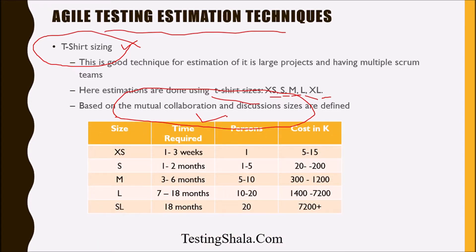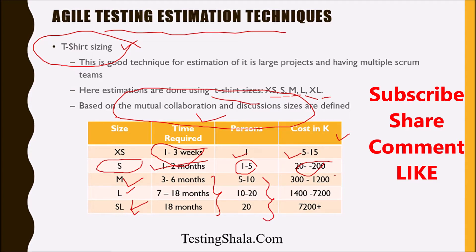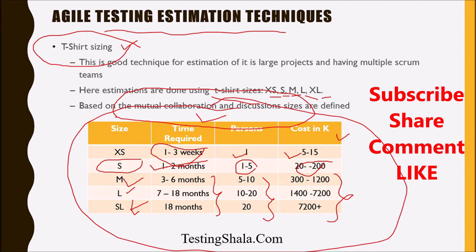For example, the sizes are XS, S, M, L, and XL. For a user story of size XS, implementation can take one to three weeks with one person, and the cost could be $5K to $15K. For size S, it can take one to two months requiring one to five people. Each size has a clear definition of time required, associated resources, and cost involved in implementing that kind of user story.